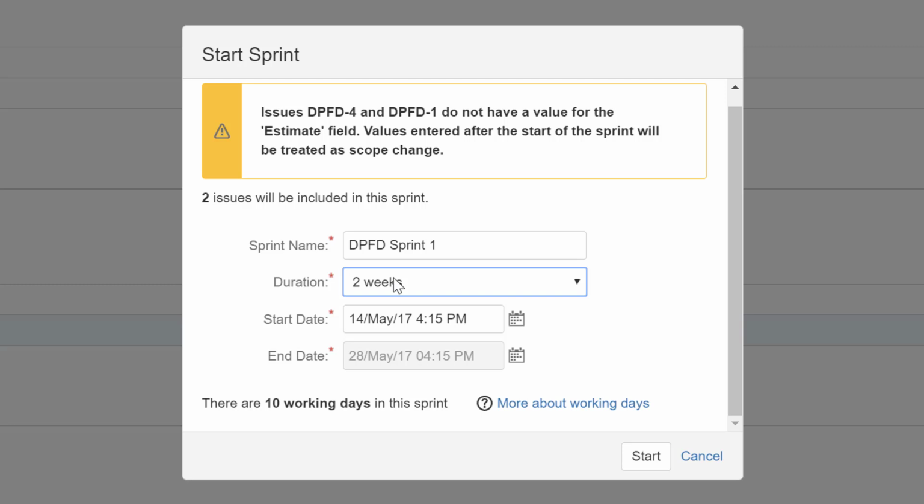They've got a project, for instance on web development, which has like 100 issues that need to be resolved, and they think, okay, let's create our first sprint. Let's do 4 weeks, and let's add 60 of them. You need to ask yourself, is it achievable? Am I going to achieve my goal, resolving 60 issues in 4 weeks? Well, maybe yes. Maybe they are very, very small.